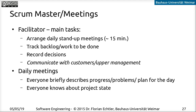The Scrum master keeps track of the current backlog and what's next to be done. If the team makes any decisions, they record that for the future. Most importantly, the Scrum master is the one person that communicates with the customers and the rest of management. Ideally, if Scrum is done properly, it's not possible for somebody from upper management to go directly to one of the developers and tell them to drop everything and implement a new feature — everything has to go through the Scrum master, and it shouldn't happen in the middle of a sprint cycle. So the team is actually isolated from external influences by the Scrum master, which generally keeps the project flowing much more smoothly.